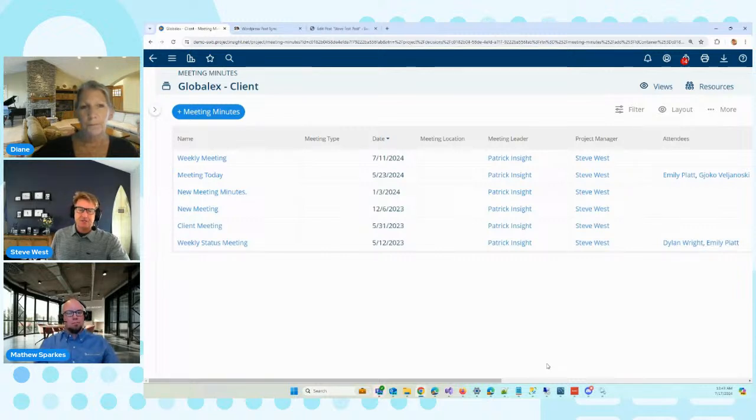Well, I think that's where the time entry comes in. If you are a company like ours, we use time entry here, and we use it for two purposes. Everyone thinks, oh, one is for billing, but secondarily, for the non-engineers, estimating is a big challenge. So if you know that you're underestimating because you've logged your time, you say, okay, I think this task is going to take this person 20 hours, and then it takes them 30 or 40. Then you go back to the why, right? Why did it take 30 hours? Is it because I underestimated? Is it because this one engineer's skills need to be shored up? Or is it